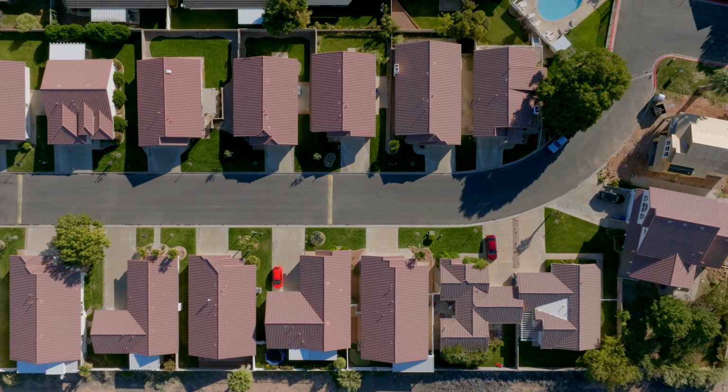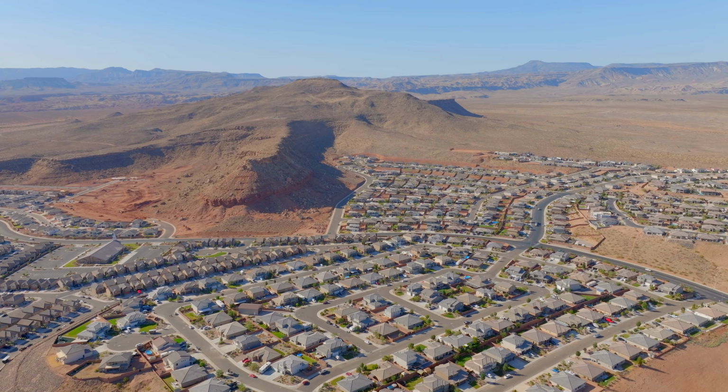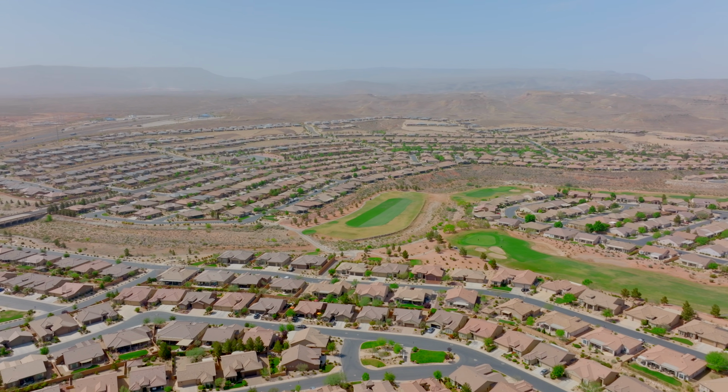If I had a pad that was ready to go and I didn't have to deal with that, that would have cut 3 to 4 weeks off the build, and I could have gotten it done in maybe 7 months. So for the average production build home, they can actually complete homes, and I've seen them as fast as 3.5, 4 months, but they're cooking, and they're all about schedule, schedule, schedule. There's very little time to think or improve or tweak or reconsider. They've built them over and over again, and they're going to get them in and get them done. That's where the time value of money is of the utmost importance. They don't want to waste time.